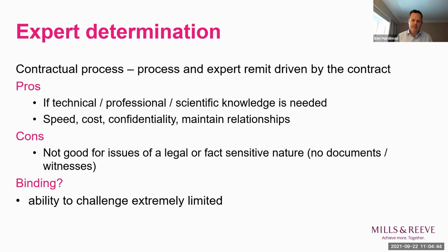Secondly, and as I put on the screen, this is perhaps a bigger issue from a construction perspective, which is it is less suited for resolving claims which involve factual disputes and which are going to involve some review of documentary or witness evidence. It's also not good where there are particularly complicated legal issues involved, because more often than not, by their very nature, an expert is an expert and not legally qualified, so may well not be able to provide the input into those parts of the dispute.